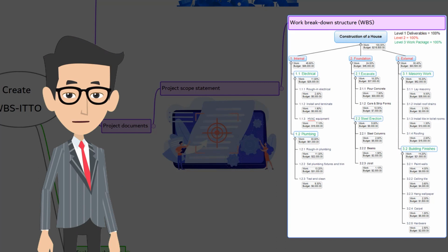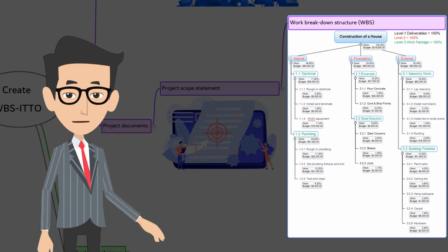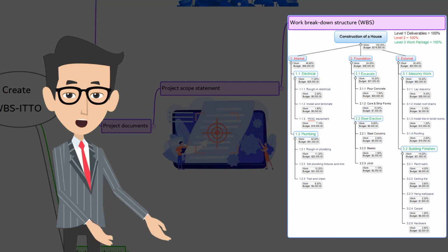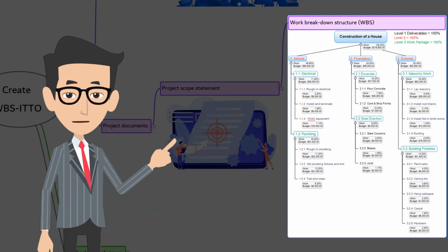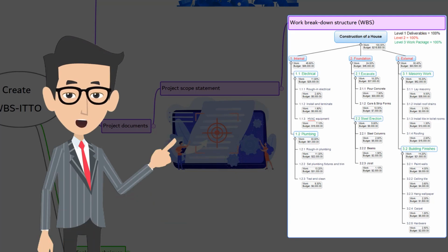As discussed earlier, every task will have start date, end date, duration, and resource involved. These are basic information. On top of it, there will be information about the predecessor activity, successor activity, and risk involved, etc. You basically attach every possible information to an activity. This will help the project team get to know more about the task. That becomes handy during project execution. This complete information, such as start date, end date, duration, resource, risk involved, predecessor, successor, etc., is called Work Breakdown Structure Dictionary, shortly WBS Dictionary.